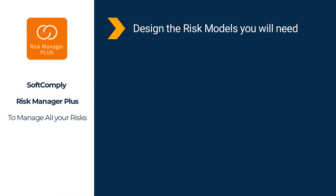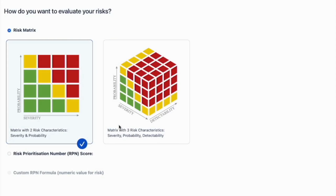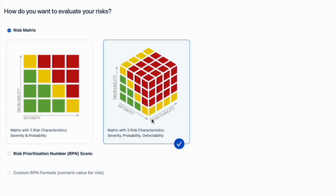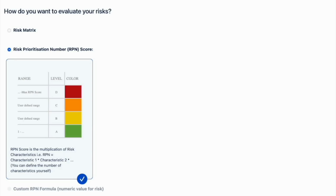The first step is to design the risk models. You can use different risk models for your risk evaluation purposes — you can have a two- or three-dimensional risk matrix, or a multiplication of the risk values, otherwise known as the risk prioritization number.